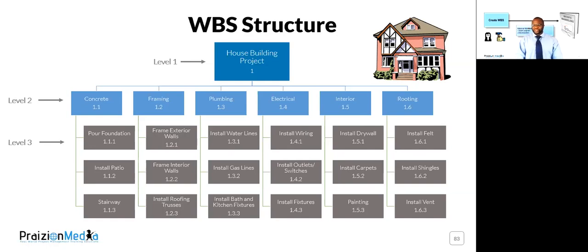Not going into the tasks. Very important to note, the WBS is not a task list. No, it is a visual hierarchical depiction of the work that needs to be done. So it's not a list of tasks. The WBS should not contain tasks at the lower levels of 1 hour, 30 minutes, 2 hours, 4 hours, no. There are many rules that people put out there, but just think about it like this. If a WBS at the lowest level can contain 1 to 2 weeks worth of work, then you're at the right level.